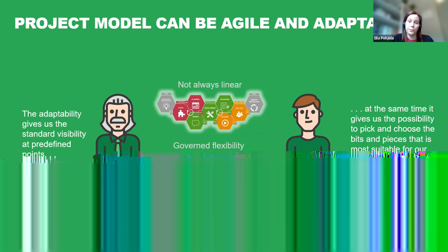And so here what we did was that before the first release went into production, we moved from this sequence into a more agile way and added sprints and added releases. And now we will stay here in this rollout phase and release more releases until the high level project scope will be reached. And in the next slide, I show you how this is going in practice.